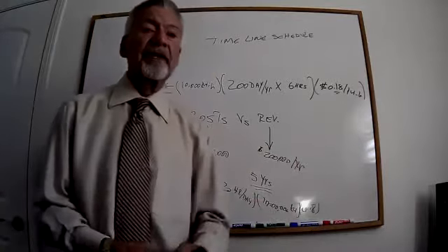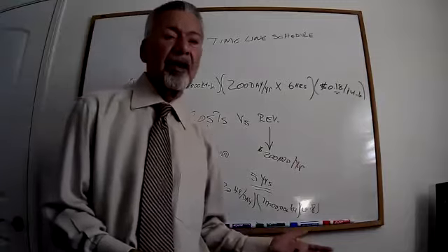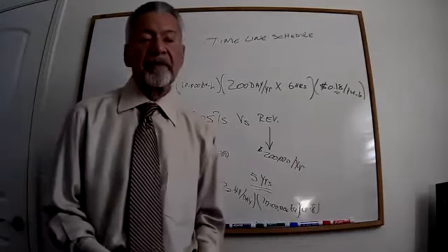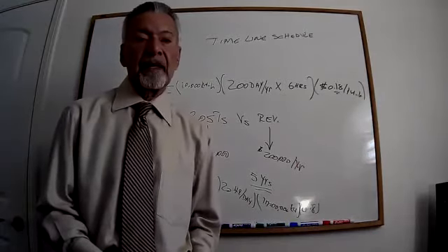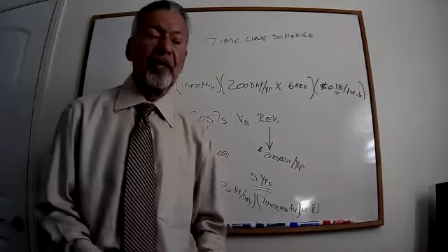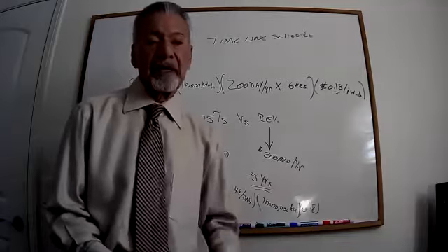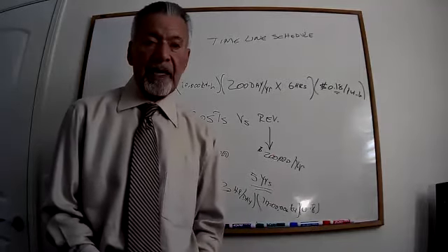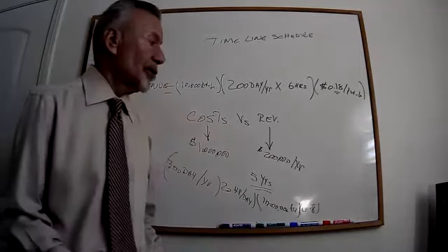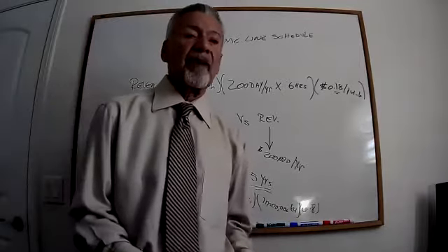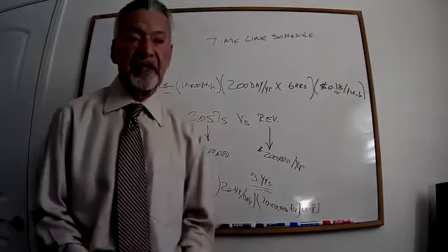You're increasing your revenue while the basic costs remain almost the same. Construction costs, engineering costs, all of that remain the same. Your equipment cost goes up a little bit. If you double your size of a project, your equipment costs will go up about 25% or 30%, not double.